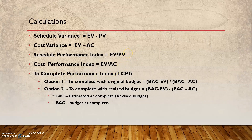When the Schedule Performance Index equals one, the project is on track. SPI is EV divided by PV. If you plan to make one table per day and you actually make one table, there is no schedule variance and no cost variance. For example, if the planned cost is $100 and the earned value is also $100, then $100 divided by $100 equals one — the SPI and CPI are both one, indicating on-track performance.